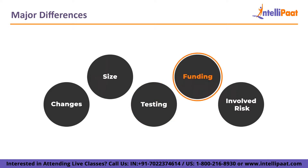Regarding funding: Agile is flexible and welcomes adaptation, experimentation, and changes in course even in later stages, so the budget is typically more adaptable. For Waterfall, the budget is typically established at the start and since the project is planned from beginning to end, it is less possible to alter the budget midway. Regarding risk: Agile blends well with non-fixed finance, duration, and resources, whereas in Waterfall, with firm fixed-price contracts, risk can be decreased by securing the risk agreement at the outset.